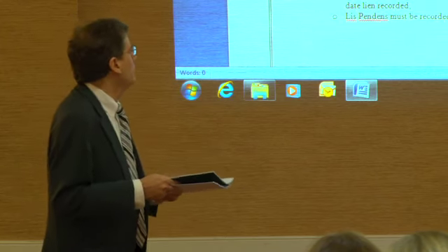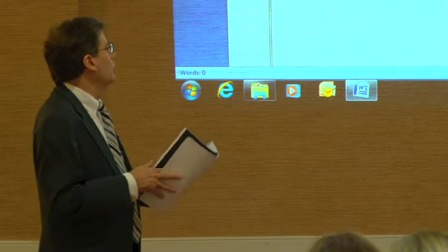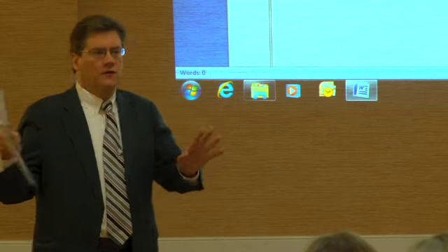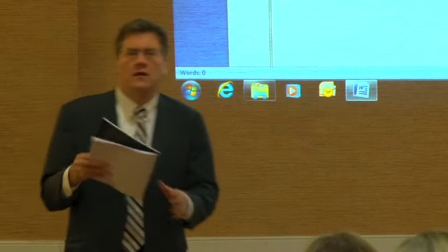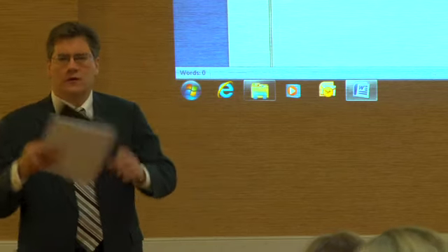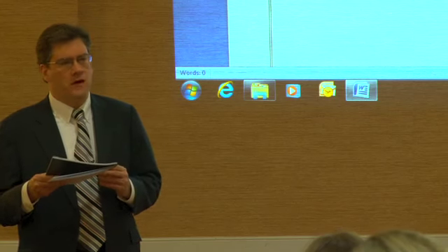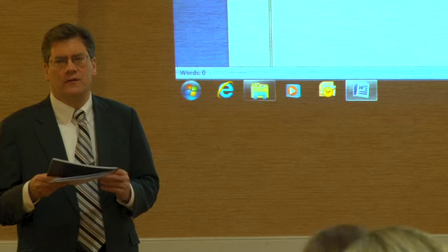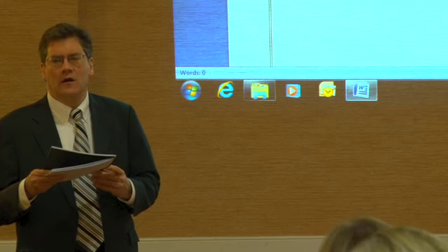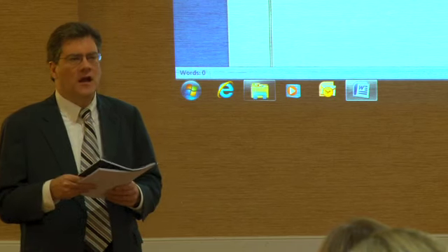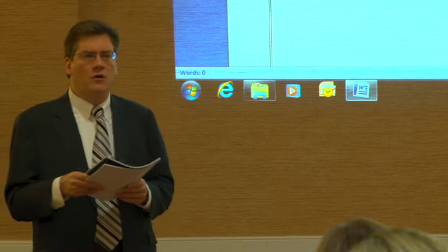Okay, service, well, now we're skipping back to lien claims. So that's what an NOC is. Now let me tell you something. We used to see notices of completion all the time in the middle 2000s, all right? They were wrong most of the time. At least half of the time, the date of service was not within 15 days after the recording date. And they were just facially invalid. People didn't know what they were doing.